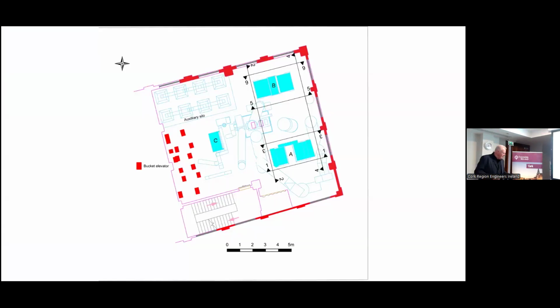So the recording and the conservation process, this is the one that we decided to keep. And the reason for that is to get that out, we'd have to knock a hole in the wall onto a road, and the same on the other side. Here, it's into a yard which is controlled by the developer. So we're being practical about that. The pretty one, we're not going to keep that. We're going to be easy, we're going to be practical and get this out safely.